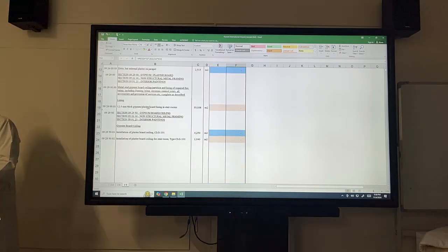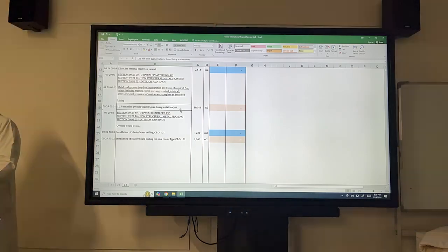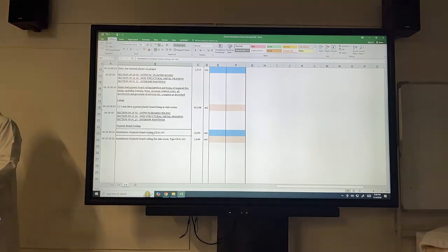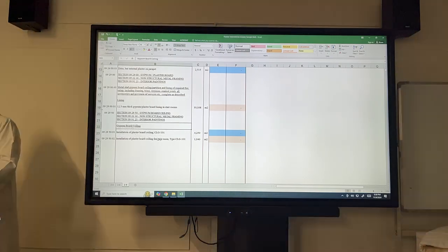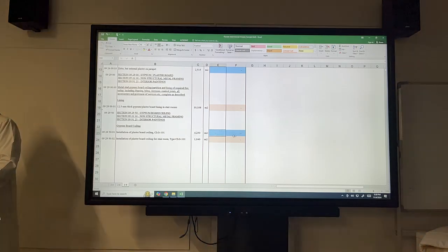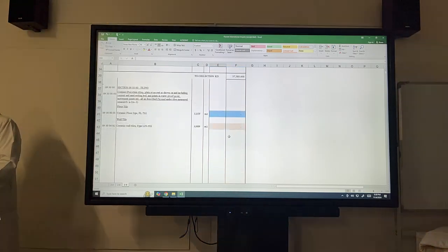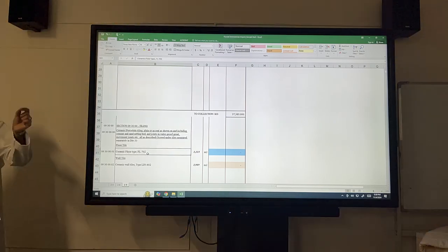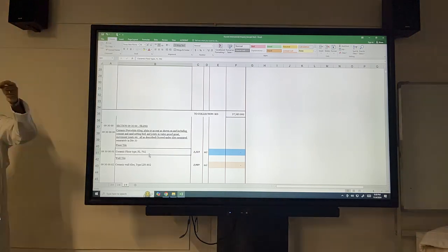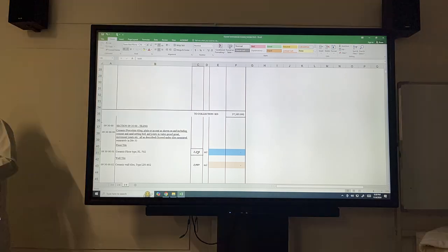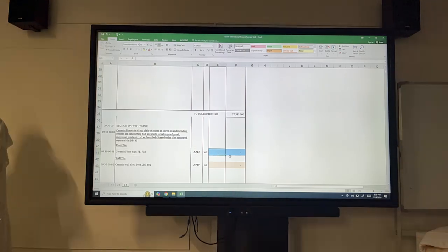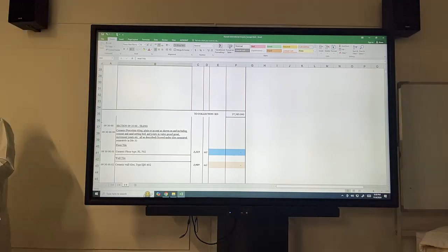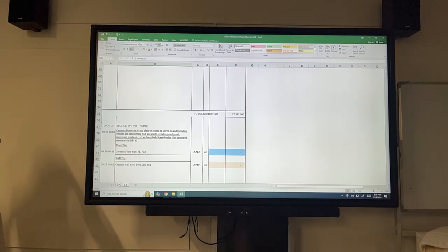Here when we talk about gypsum or plasterboard lining, installation of plasterboard ceiling. That gypsum ceiling, that's what you're going to put in your project, for example. Again, quantity, how much it costs. So the total will tell you what the total is. And then I need tiles, ceramic type. BR01. This is FL702. It tells you the 1000 meters, how much the meter costs, and then the total. This is for the floor. This is for the wall. So that's division 9, which is finishes.